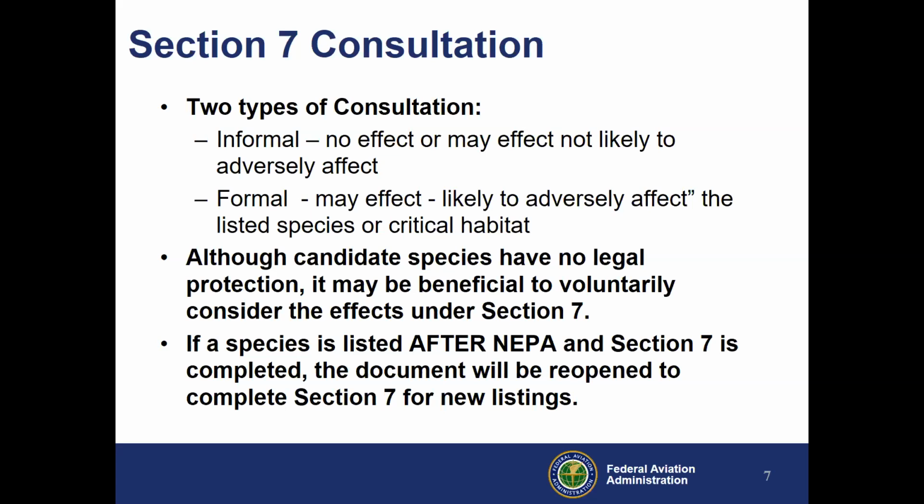So if we currently have a candidate species during NEPA, we'd like to actually work through the effect determination and get it taken care of, because the likelihood of the project getting constructed, say 3 years from NEPA, the species will likely be listed by that point.